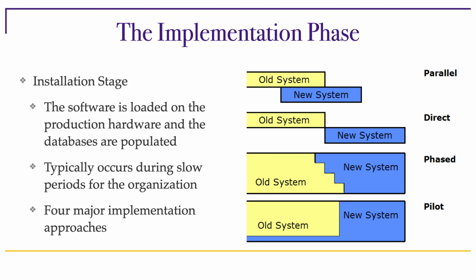Another approach is called the phased approach. And what this little image is trying to show you is how components of the system are turned on at different times. It's similar to parallel, except that you're not running the whole system in parallel. You're just turning on components.